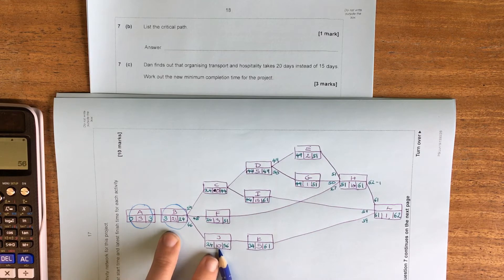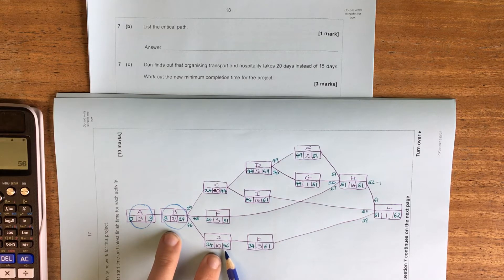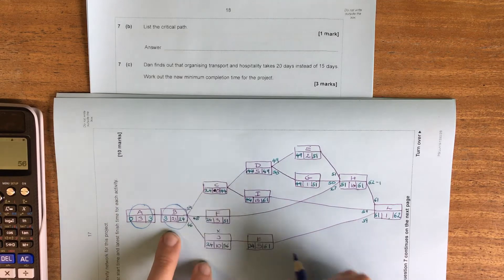This one, 24 and 10 is 34. So this could finish at 34 but doesn't need to finish till 56. So this one, not critical.